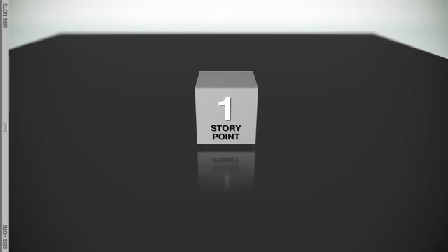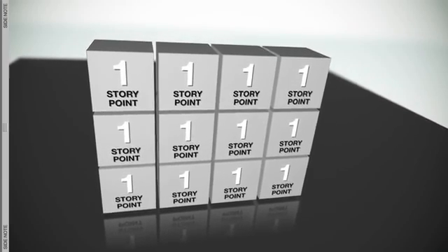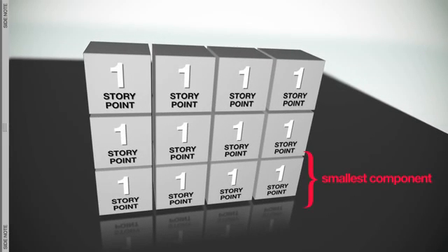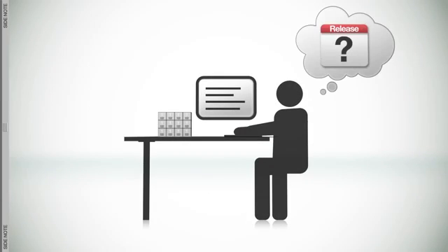There are a lot of techniques for creating good estimates. Some prefer estimating in story points, where estimates are made relative to building a small component with a known level of difficulty. Unfortunately, story points don't answer the question of, when will my project ship?